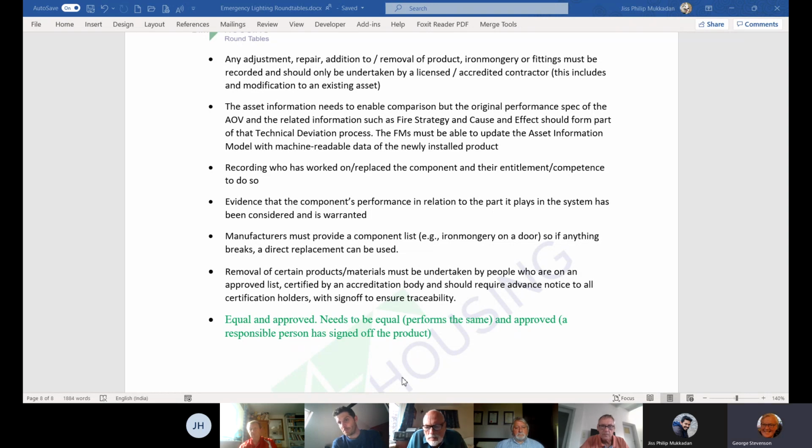I agree, but one of the things you're going to have to consider in terms of data management is if you change something, for the original product you probably need something like a photometric file. If you change that original product, you need information on that new product with its photometry, but you need to keep the original one until you change the design. Yes, because that is the product that was used for the design. So you always have a historical element in it until you do a complete redesign.